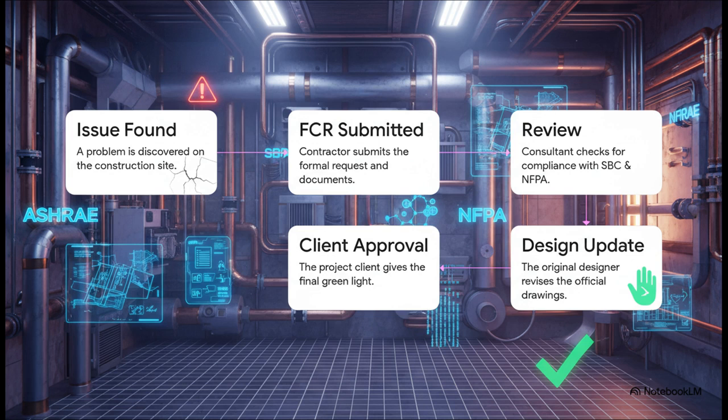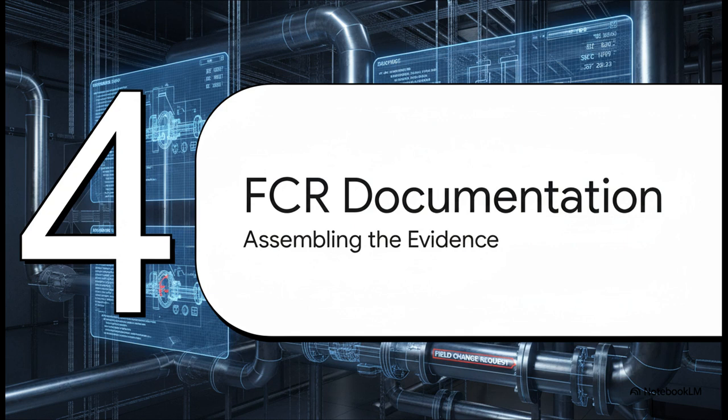Fourth, if it's all good, the original designer updates the drawings. And finally, number 5, the client gives that final green light. Every step is a quality gate to make sure things are done right. You have to remember, a request is only as strong as the evidence you provide.